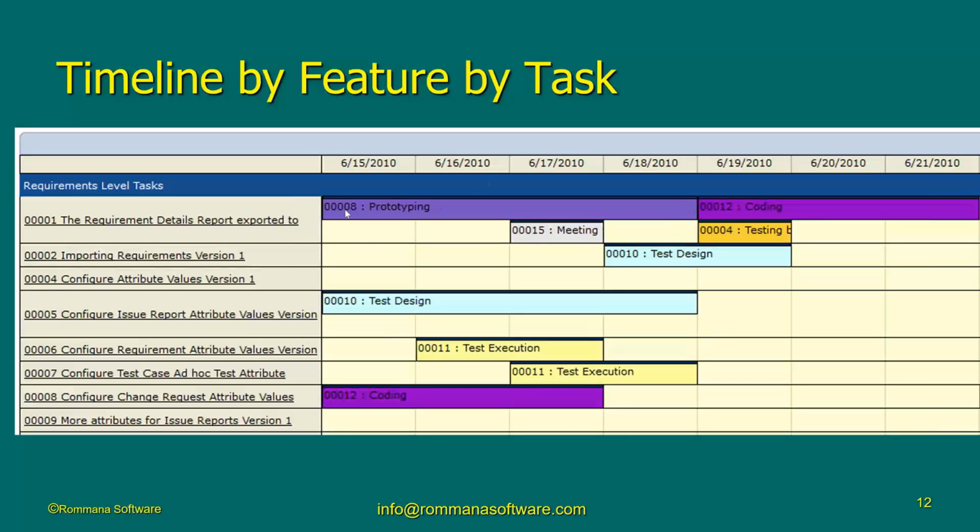Okay, this does not mean that we're going to be taking 4 days times 8 hours. That's 32 hours. No, we might be doing just 4 hours a day, but we're doing other things. So the time estimates do not line up exactly with the duration. You know that. Of course, Microsoft Project does not do that. If you're using Jira, I am not sure if Jira allows you to do such a thing easily.